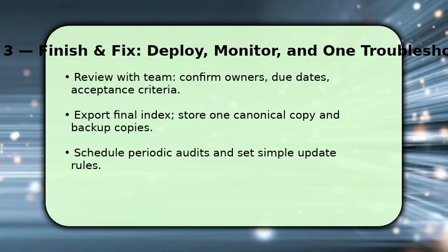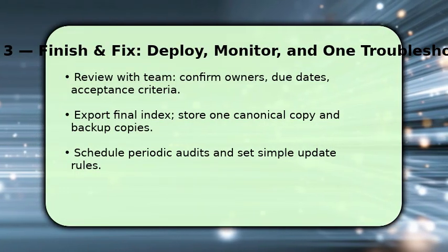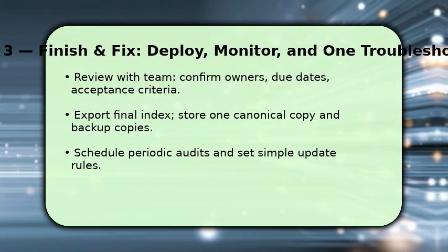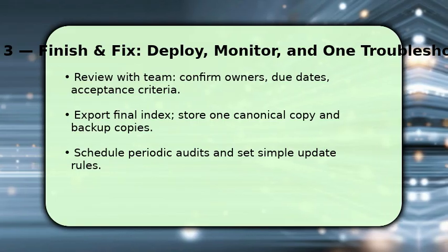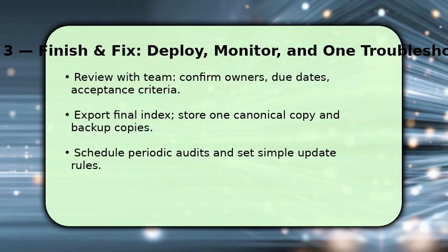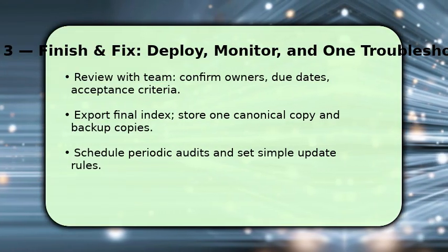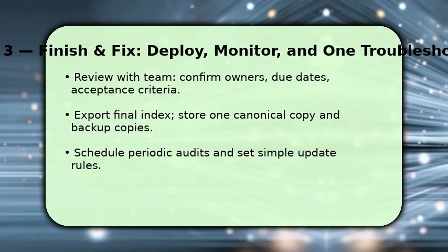You finish by reviewing the compiled index with the team, confirm owners, due dates, and acceptance criteria so responsibilities are clear. After agreement, export the final index and store one canonical copy in the shared location, plus at least one backup. Then set a simple update rule and schedule periodic audits to keep the index current.